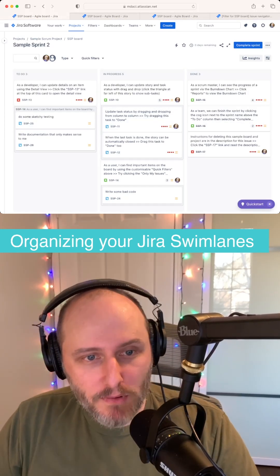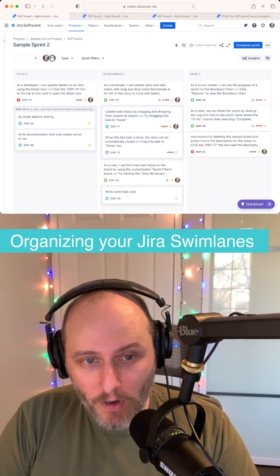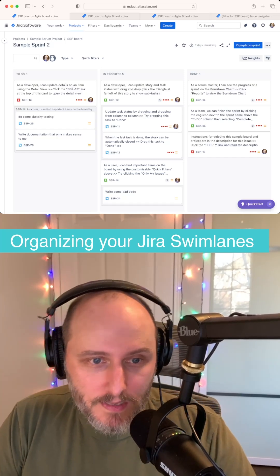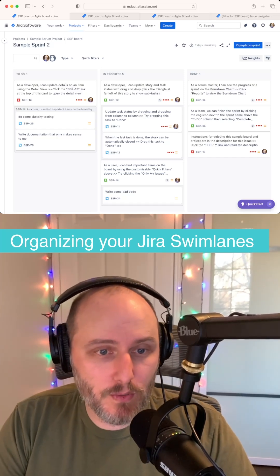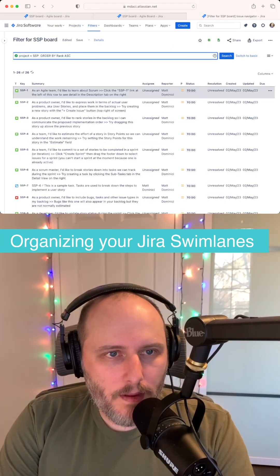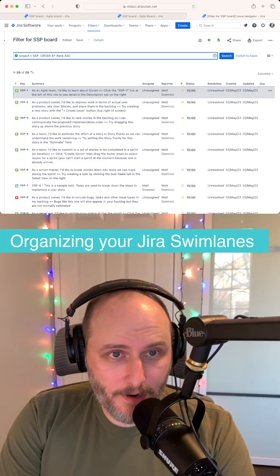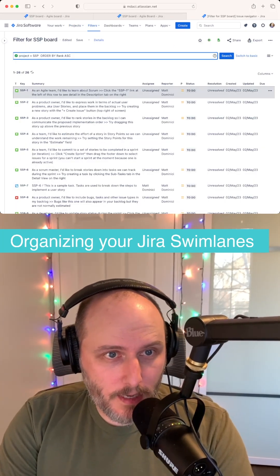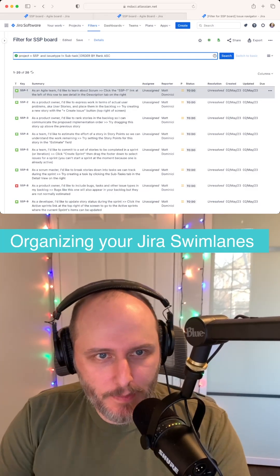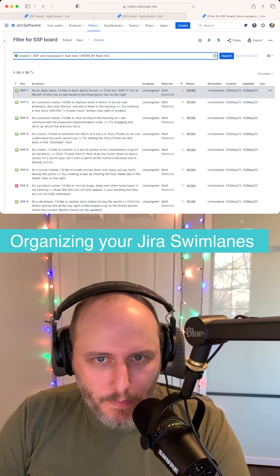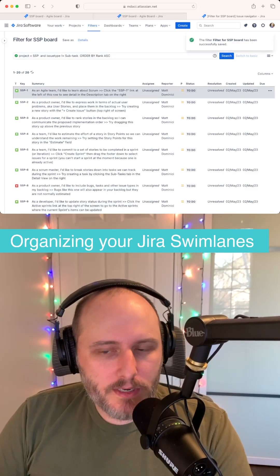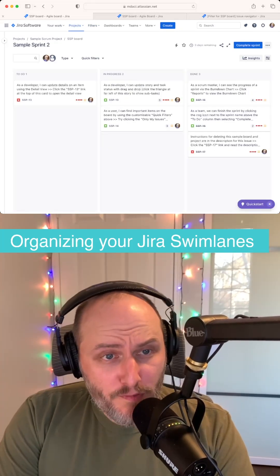Now there are two things here: you probably need to define a workflow that is more detailed than just to-do, doing, and done. And the second thing you're going to want to do is hide all those subtasks, otherwise they're going to be all mixed in with your PBIs — and we certainly don't want that.